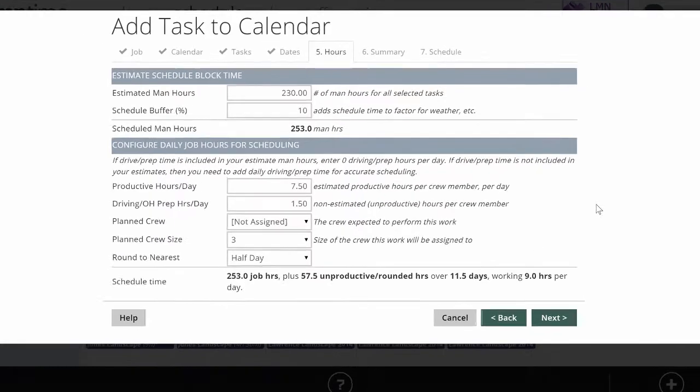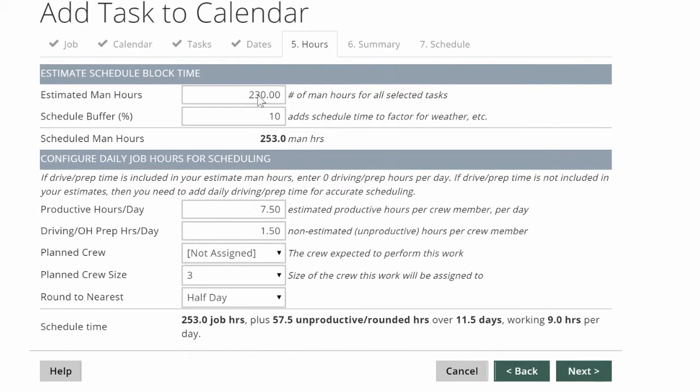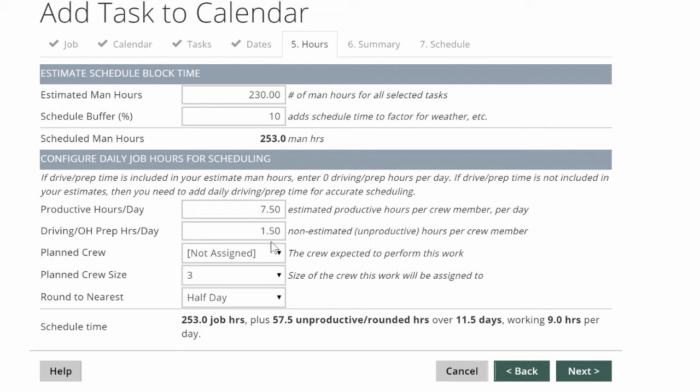When I click next, it's going to bring over the estimated man hours from the estimated tasks I picked in the step earlier. It'll also add that buffer to give me some extra time for mistakes in weather, and it'll use the productive hours per day and driving hours or unproductive time per day to make sure that I've got just the right amount of time scheduled for this work.